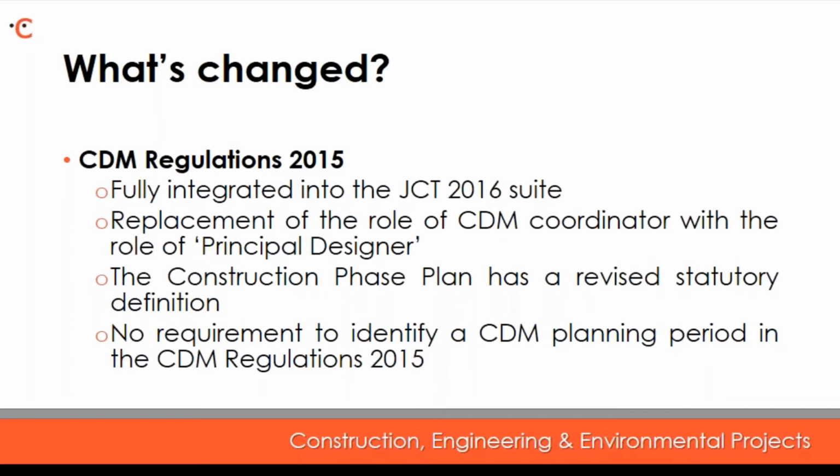So the first change is to the CDM Regulations 2015. Following the introduction of the CDM Regulations 2015, an amendment sheet was published in March 2015 by the JCT, and that was appended to the 2011 suite of contracts. These amendments are now fully integrated into the 2016 edition contracts.